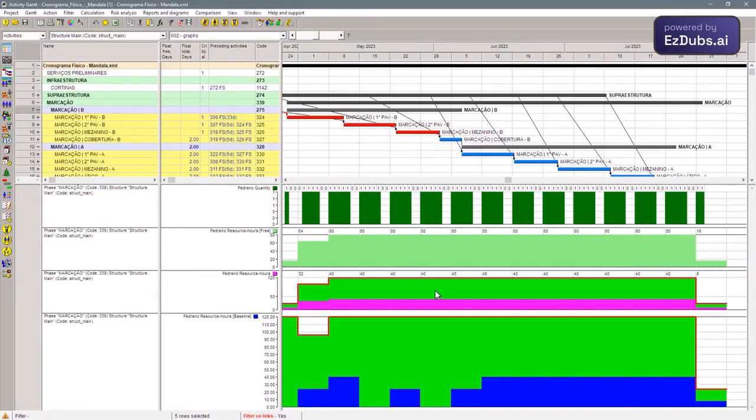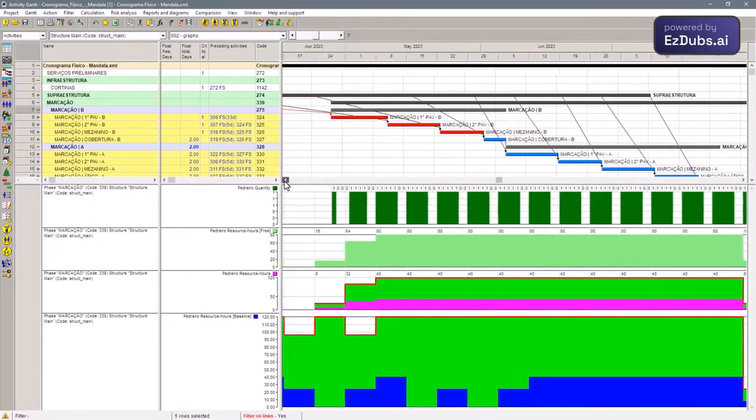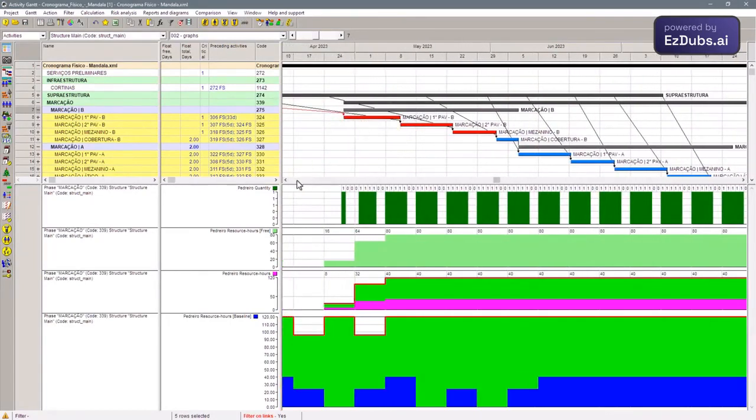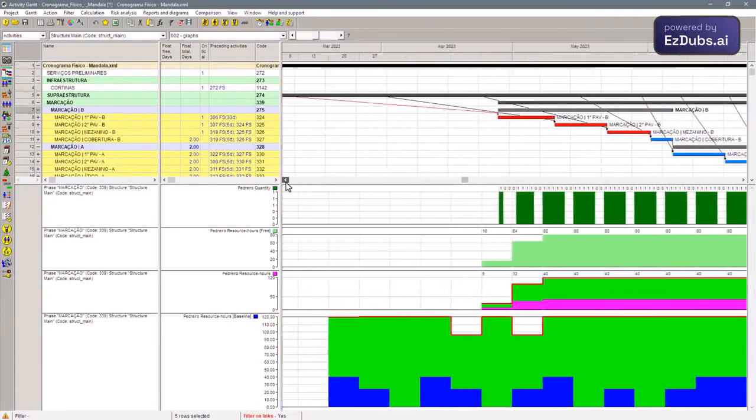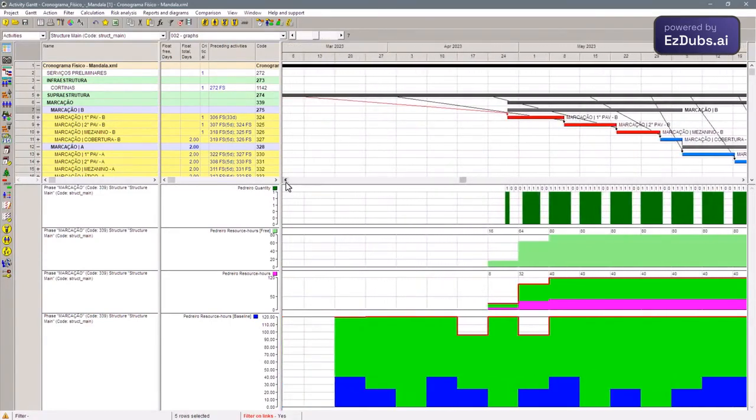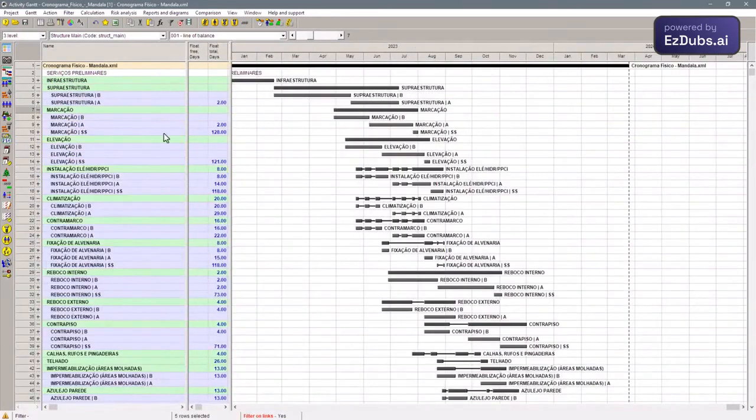Today we have unused paid salaries, there is green, but only from a date, which is the beginning, not in the traditional way given by the CPM, which did not take into account optimization of resources to guarantee optimization of the workforce. In this case, we would be able to do this for all activities that present bottlenecks.